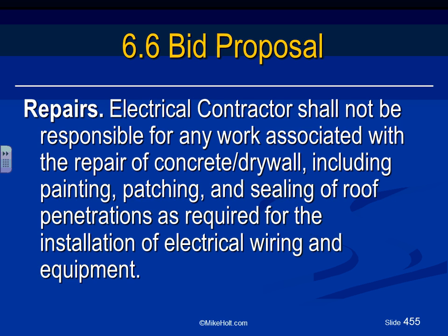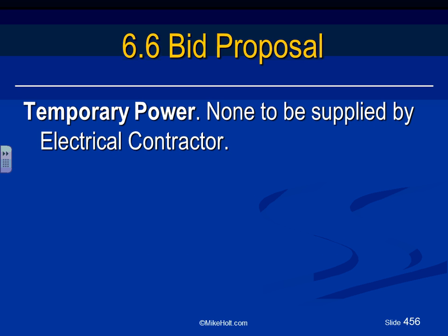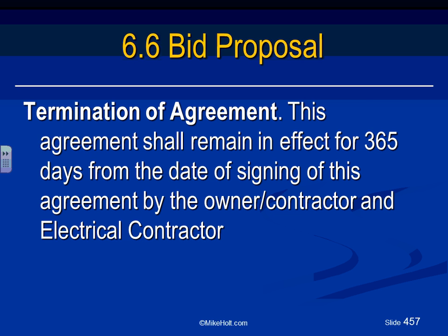But you have to specify who's going to be repairing all these holes they're going to be making, you or somebody else. Temporary power, are you providing the temporary power or somebody else? If not, you have to say it's not our responsibility to provide. Just because we're electrical doesn't mean that we're going to provide the temporary power.